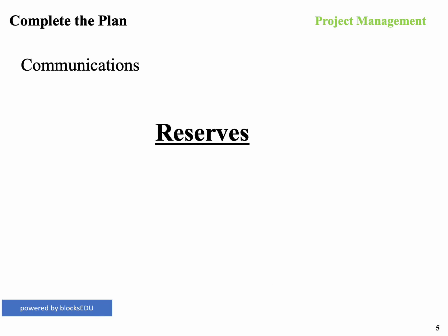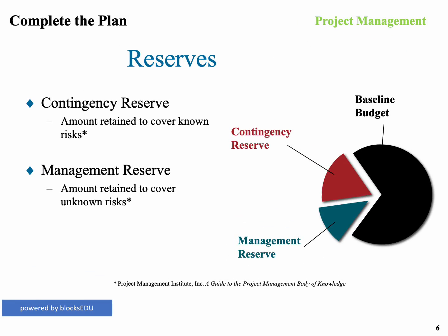We're next going to explore the wonderful world of reserves, often called contingencies. Reserves or contingencies: an interesting topic unto itself. In many organizations, the organization has determined that for every project they're going to allow what's called a contingency. It's basically an overrun. They'll say, because we don't know what we don't know, we're going to allow 10% overrun. Whatever the budget is, add 10% on it, 15% or 20%. The challenge that comes with that is, for example, if you have a $1 million budget and you add 10%, you now have $1,100,000 allocated to that project. Now, project managers are pretty clever. They'll go spend the $1.1 million, even though they may not need it for the things that the contingency is aimed to overcome.